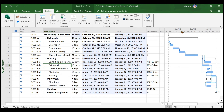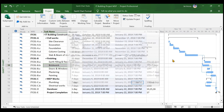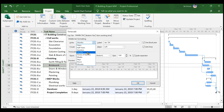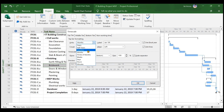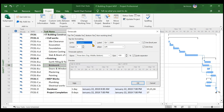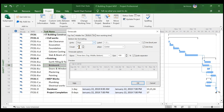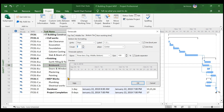If you want to see calendar changes in your Gantt chart, right-click on the timescale area and choose the Timescale option. You will see options for tiers — these rows are called tiers. Select three tiers: the top tier set to Quarters, the middle tier set to Weeks, and the bottom tier set to Days with count set to 1 so every single day is visible. You can preview the changes and then click OK.